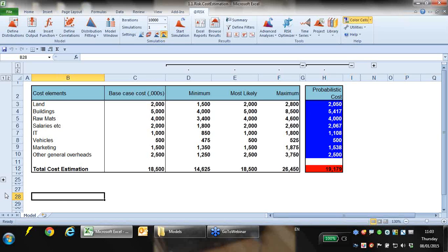And so where there's a relationship between things, we need to capture that, and we capture that through the use of correlation. So another example might be the cost of, let's say you're working in the construction industry, and all of a sudden the price of steel increases because there's a construction boom, maybe more relevant a year or two ago, so there's more demand for steel, or less supply of steel, or whatever, and so the price of steel increases.